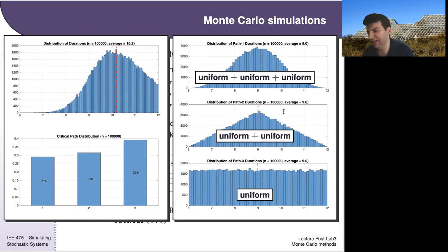There was a question in the chat related to this: could we say that doing small activities is usually better than doing one long activity? Well, I guess it depends on what you mean by better. But statistically, what I can tell you is that if the averages for the total activity are the same, and when you sum the activities up together they're independent, and by independent I mean there's no relationship between the result of one sub-activity and the result of another sub-activity, then you will get less variance in the sum than you will in the individual, because of this winning the lottery multiple times property. And that's the fundamental property embedded within the central limit theorem.